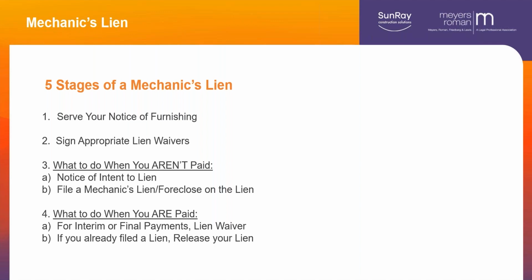Because how does it work? You start working on day one, let's say it's the first of the month, and you go through whatever day you have to get your pay app in, whether it's the 20th or 25th, and then the contractor gives that to the owner, and the owner pays, if everything goes perfectly, 90% of their pay app, which hopefully relates to 90% of your payment.